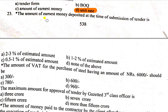Question number 23: The amount of Earnest Money is deposited at the time of submission of tender. Why is it called Earnest Money? It is the money which is submitted at the time of submitting the tender. Advance money is 2-3% of estimated cost.